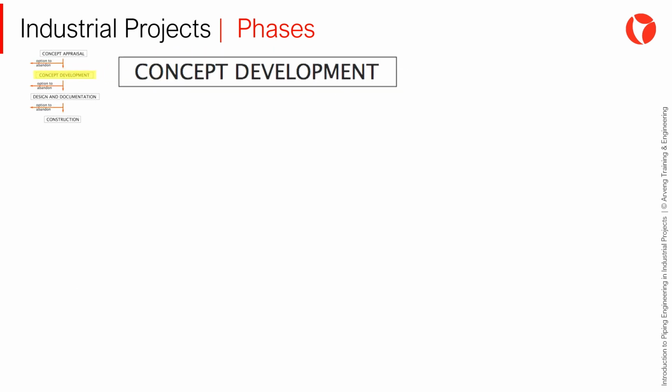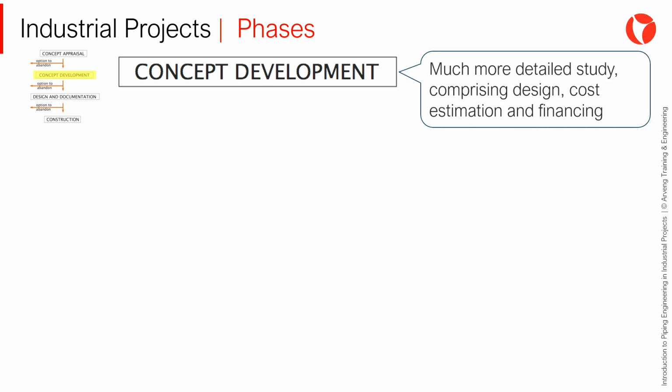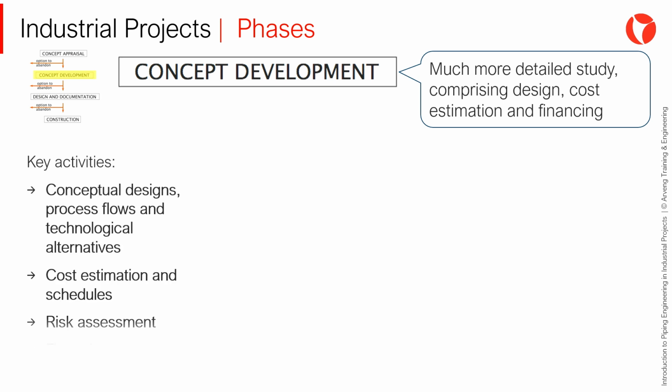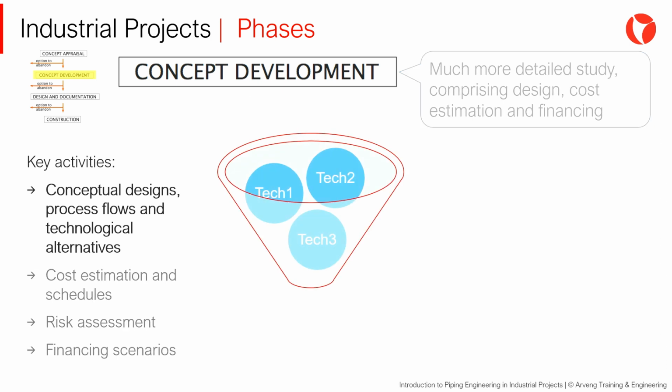The next phase is conceptualization or concept development. Here we delve into the technical design, cost estimation, and financing mechanisms. Let's look at some of the key activities carried out in this phase. In this phase, different techno-economic solutions are explored, finally selecting the one that appears to be the most convenient according to the project's constraints.